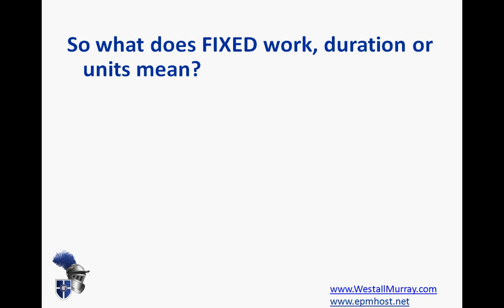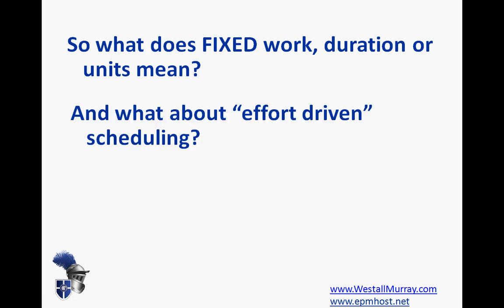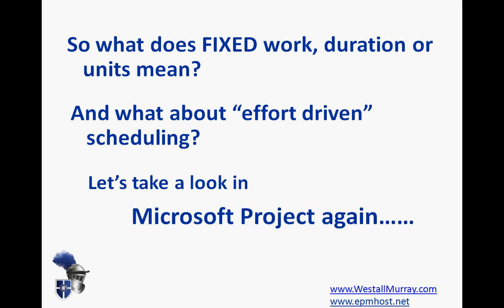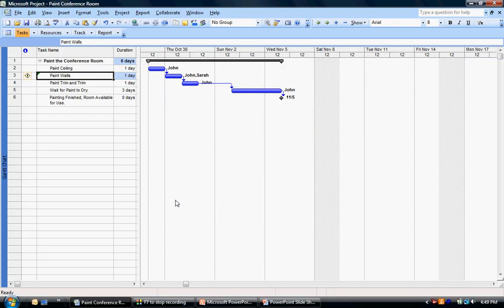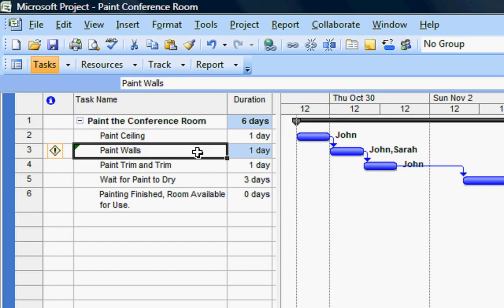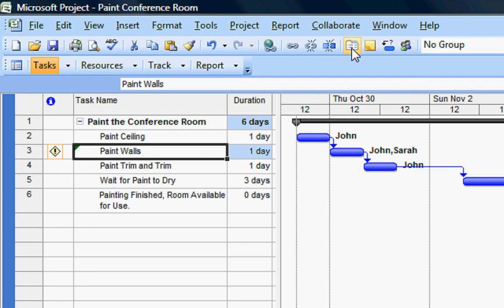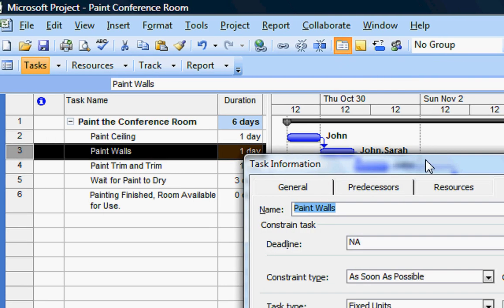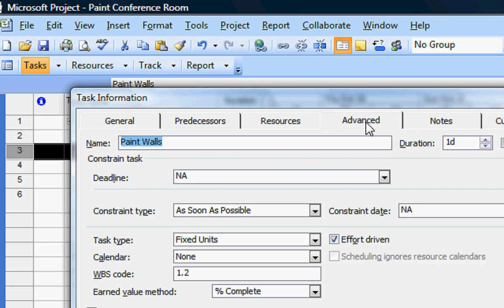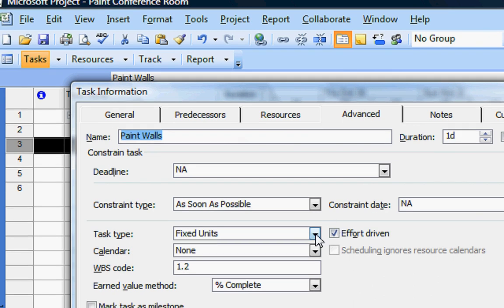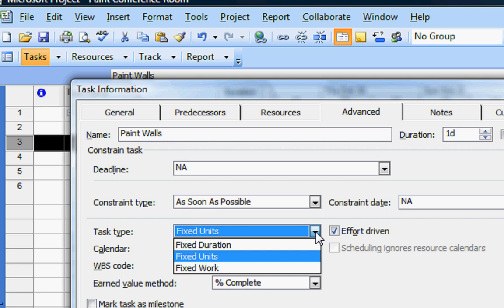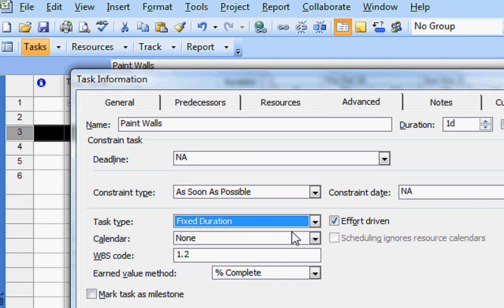So what does fixed work mean, and fixed duration, and fixed units? What about that other term you might have heard of — effort-driven scheduling? Let's see where those are in Microsoft Project. For any task — in fact, you can do this for a group of tasks as well — you can simply double-click on a task or go up to the Task Information tab, then choose the Advanced tab within that pane. You'll see that you can set tasks to be fixed units, fixed duration, or fixed work. In the case of fixed duration and fixed units, you can determine whether it's effort-driven or not.